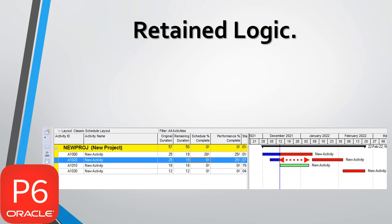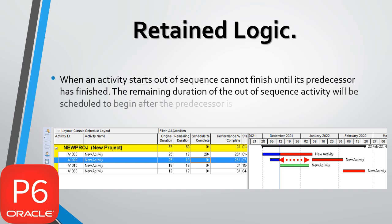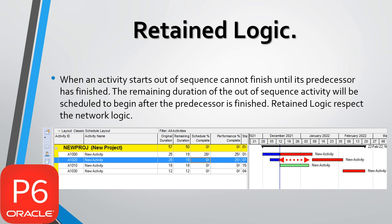Retained Logic: when an activity starts out of sequence, it cannot finish until its predecessor has finished. The remaining duration of the out-of-sequence activity will be scheduled to begin after the predecessor is finished. Retained Logic respects the network logic.